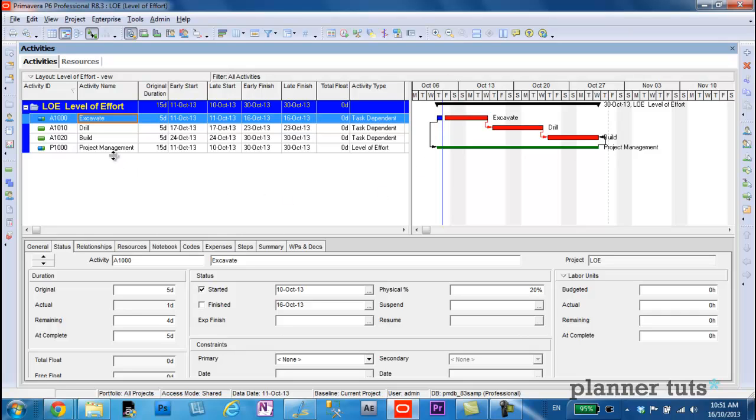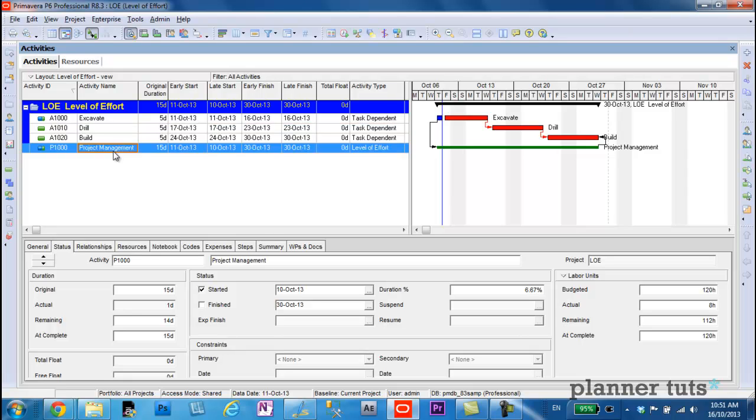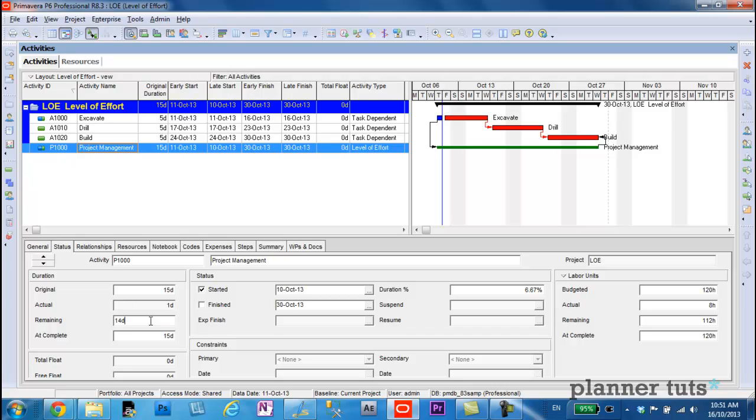Let's go and have a look at the project management activity, our level of effort. So you can see here that it also picked up an actual start date, because it's checked off here started. And it also has an actual duration and remaining duration. So all of that happened from statusing the excavate activity.